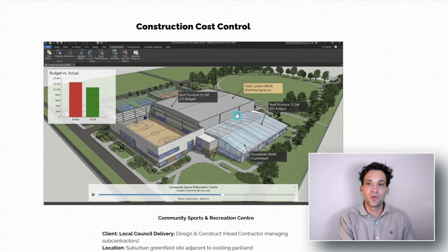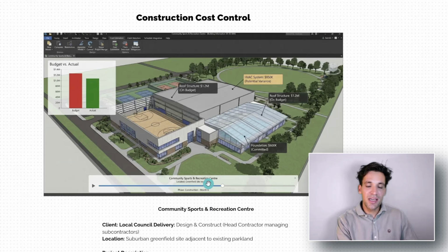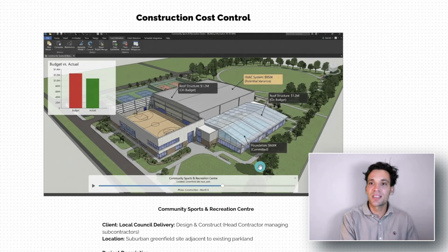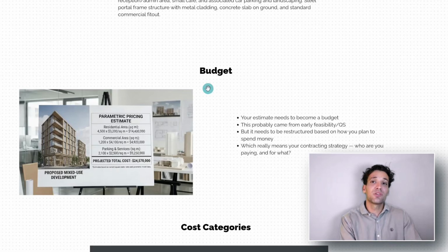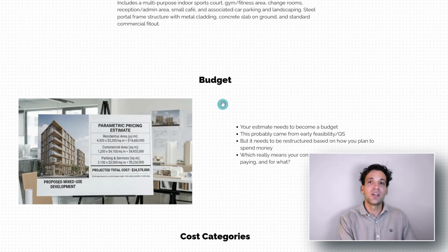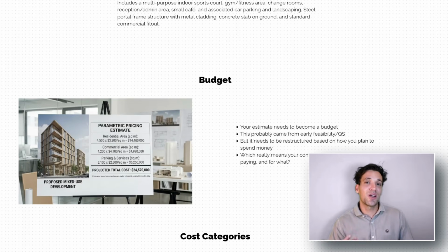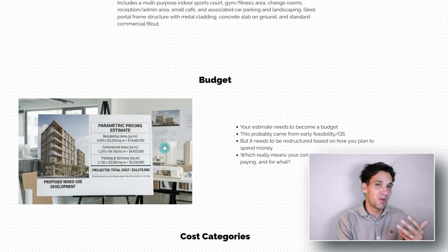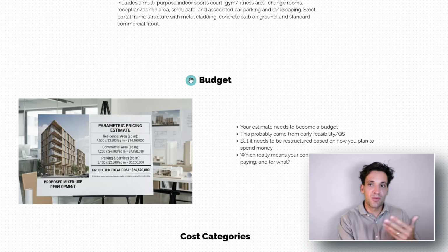So take this project, for example. If you are the project owner, you probably engaged a quantity surveyor or an estimating firm to come up with an indicative cost to do the project. The entire way they would have structured the cost to do this will be around the easiest way to prepare, justify, and explain the estimate. So they might have used parametric estimating. They might have looked at the total square meters and inferred a cost from that.